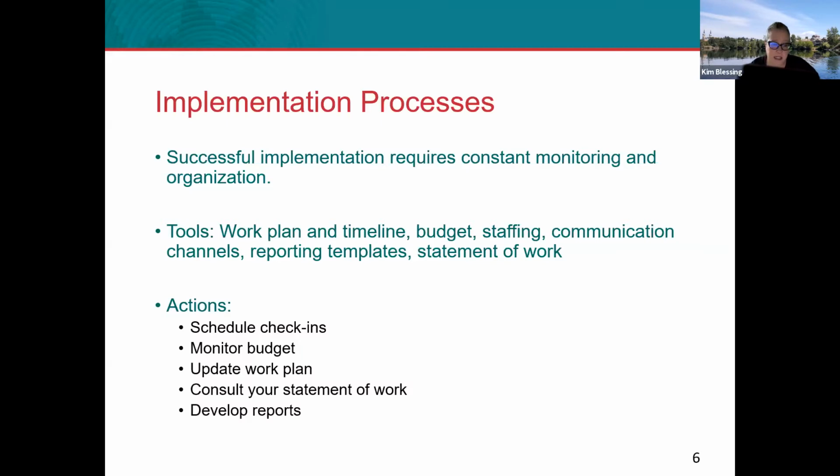You can use work plans and timelines. Work plans are detailed documents that include all of the information about how you're actually going to perform the work. They typically include timelines, staff assignments, task descriptions, and a comments area or notes area where you can constantly update as things change throughout your project. One of the keys to project management is understanding that no matter how well you've planned, things will change. Things will come up that you don't expect, and your work plan will help you to keep track of those changes as well as adapt as they come up.